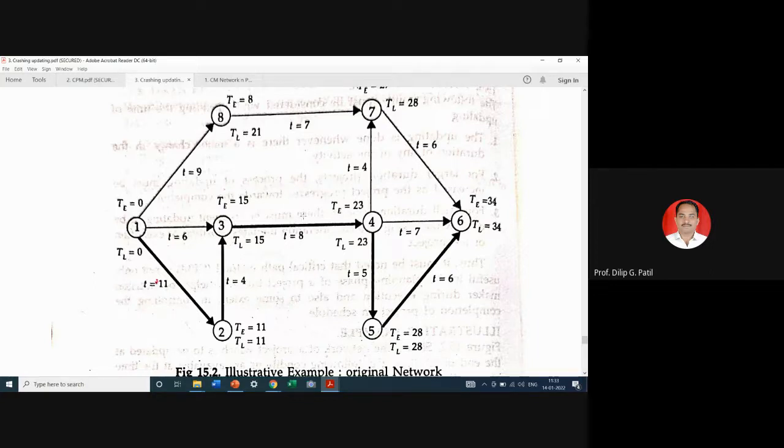Then only it will be possible that we will be on track and our project will get completed in time, or it may get some delayed, but at least there will not be much wastage of our resources, and we can cover some missed duration by adding some more resources, or accordingly we can have target, or we can say deadline. We can reach completion of the project as per given deadline.